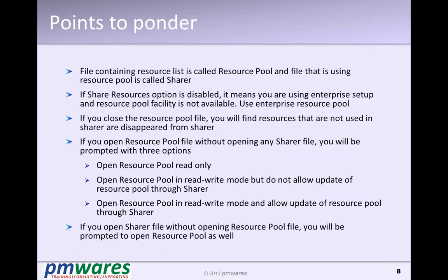Whenever we open a project file, it will ask us to open the resource pool. Normally we should open the resource pool only in read-only fashion, but we can also open it in read-write mode, or when we open the resource pool separately, we can open the other sharer file as well. However, the first option is the safest, as we should not make changes in the resource pool.